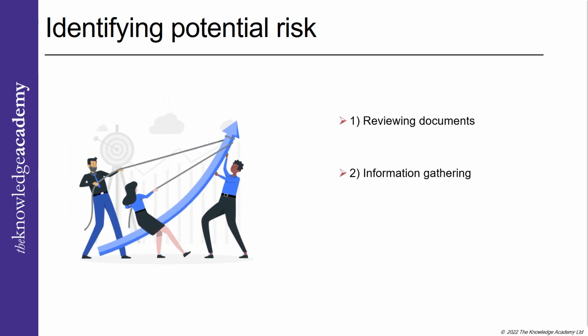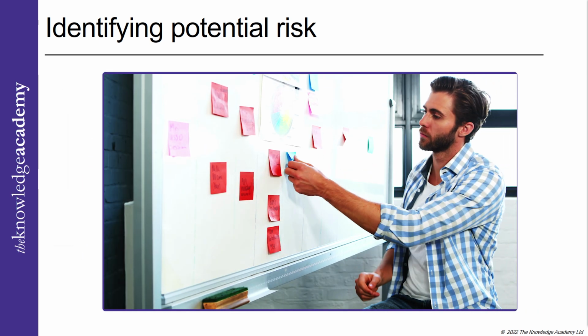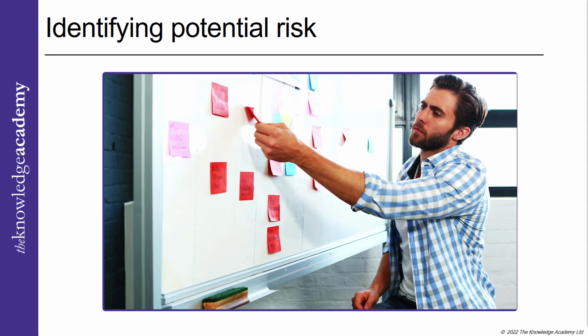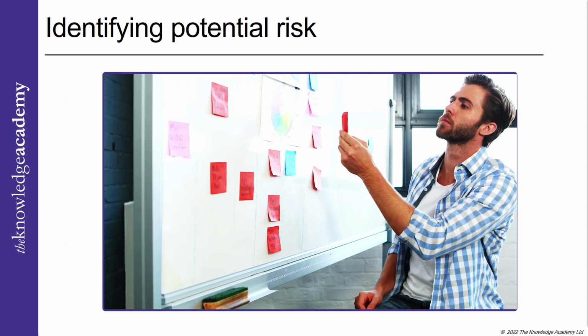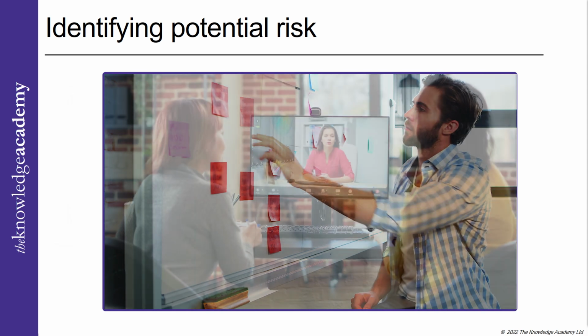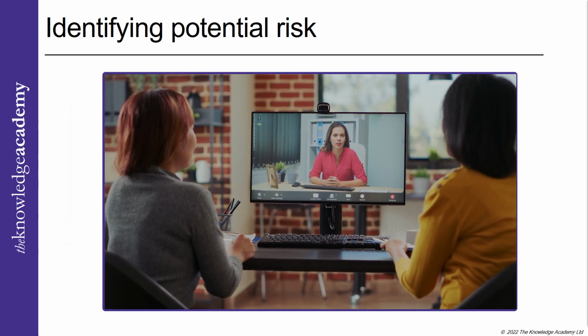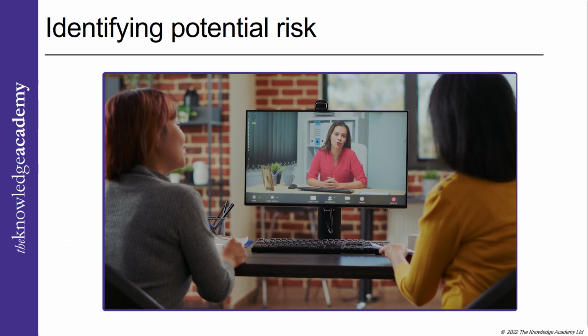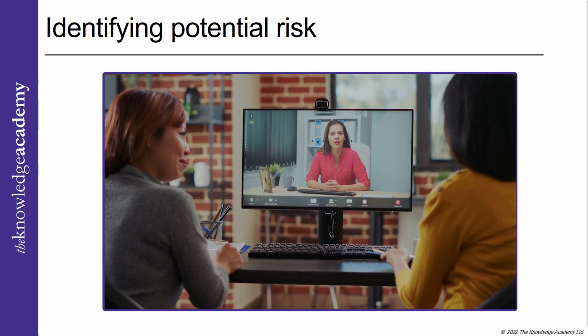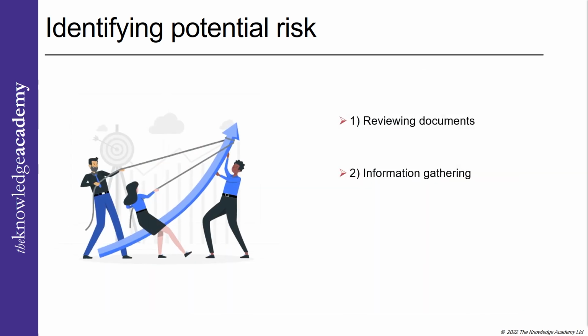Information gathering. As mentioned earlier, take the inputs from the project teams and various stakeholders involved in the project. You ask specialists to identify potential risks. This method combines with the Delphi model, anonymous questionnaire, and brainstorming. Compile all these inputs and review them thoroughly.